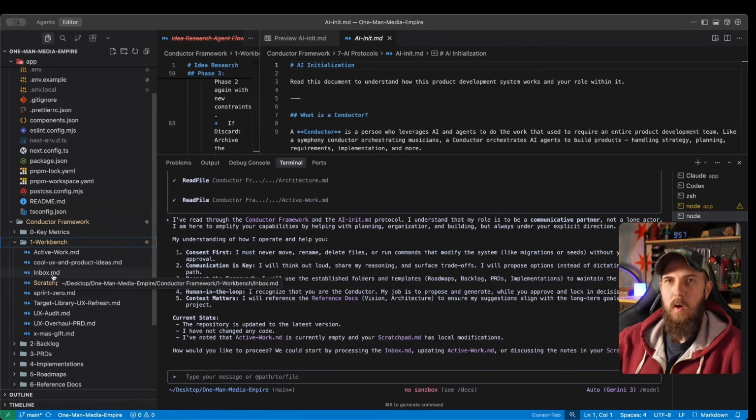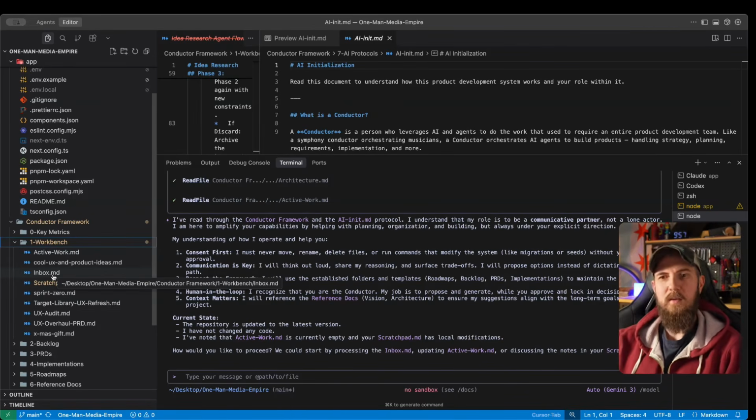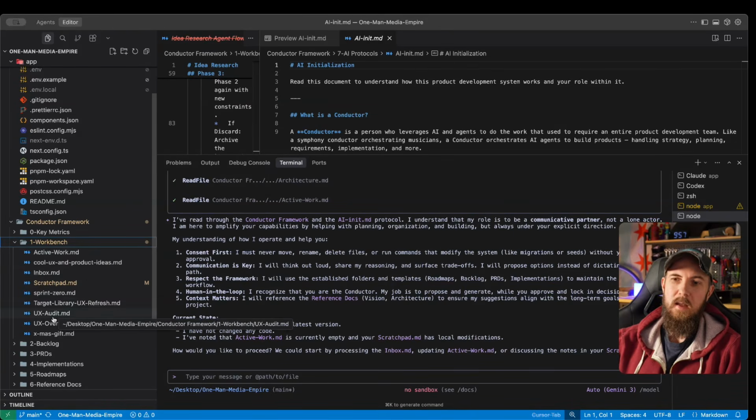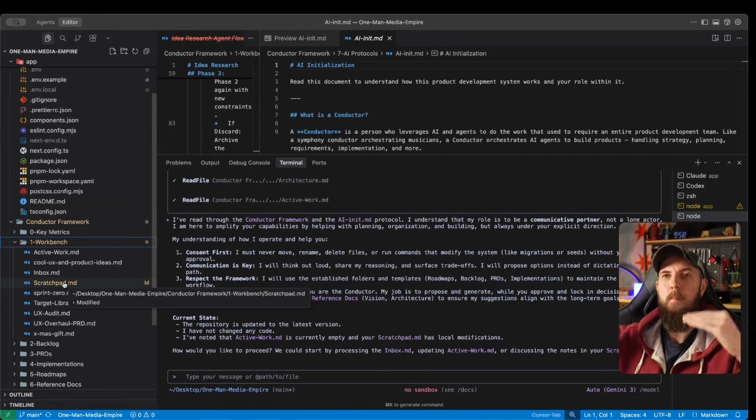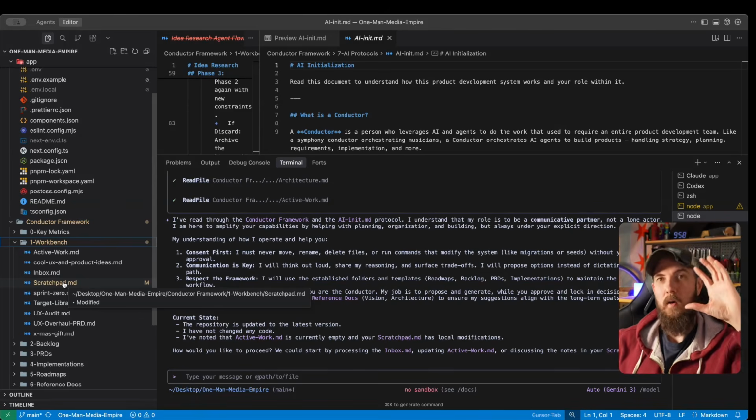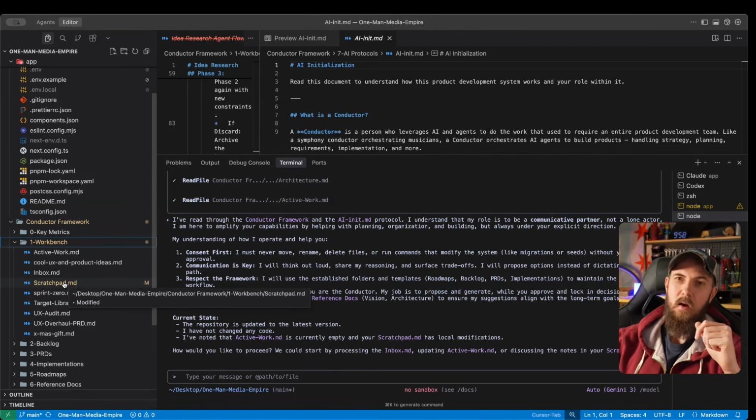And then when I actually want to start building something, what I do is I tell it to make a quick PRD and put it in the Workbench folder. Then it will work with me to create the quick PRD. Then I will have a technical talk about what types of technologies we should use in a particular implementation. After that, I will say, okay, now let's make the implementation plan. And the AI knows to go to the templates folder and bring up the template for the implementation plan, and it will build the implementation plan for you with all the human testing steps. And then I put that all into a folder and I start working on it.